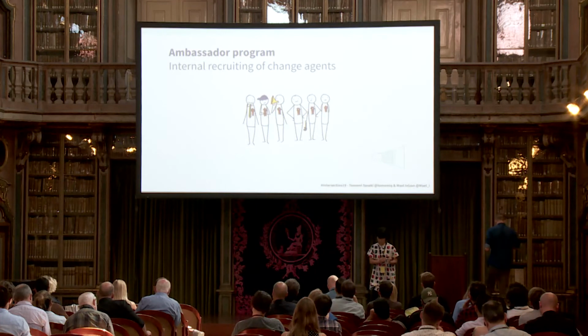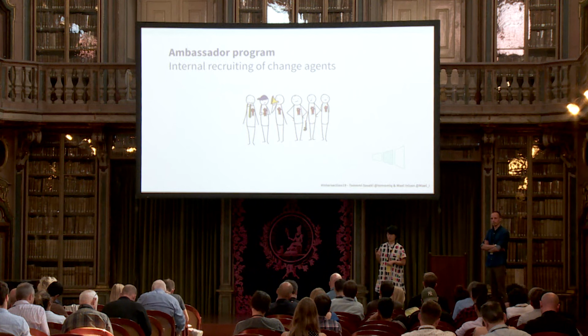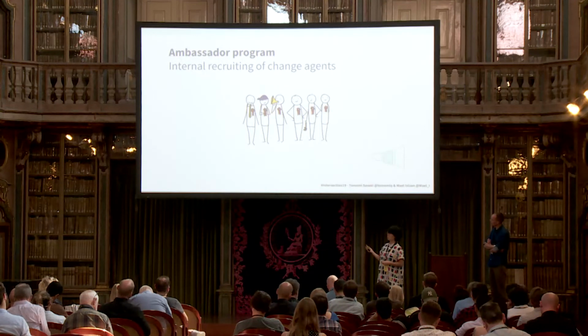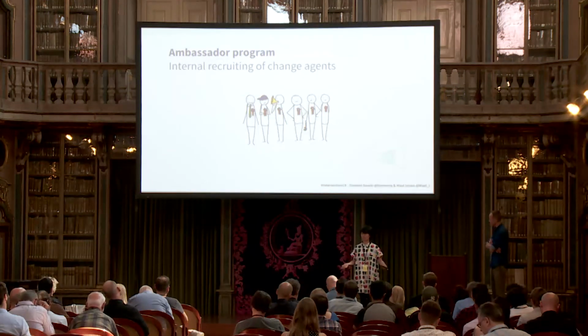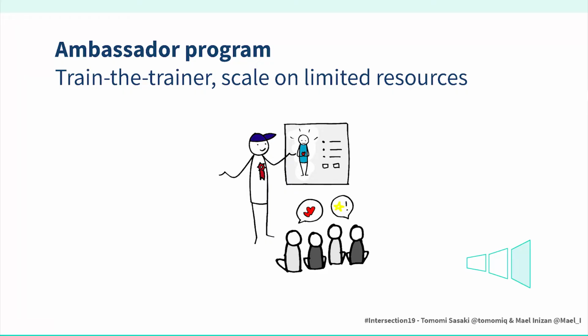And then I think one probably crucial component of success for this project was what's called the Ambassador Program. And so we recruited 3 change agents from the French and 3 from the UK side from all over the organization. It was an internal recruiting for people who wanted to join the project as ambassadors. And so they were on the phone, call center one day and then joining the CX project the other, which is really exciting. And they were the ones who delivered the training to the frontline staff.